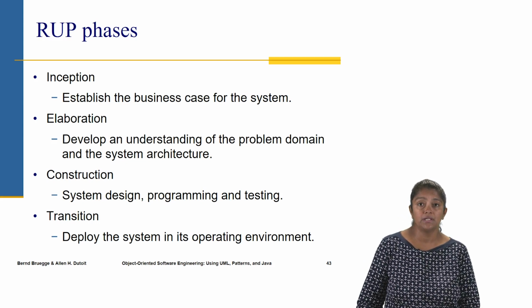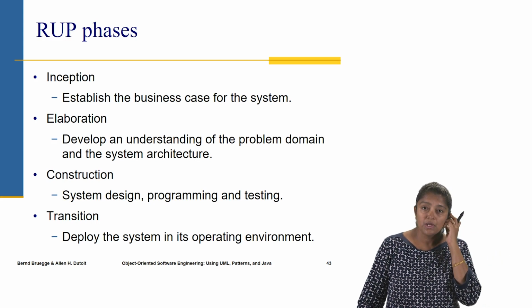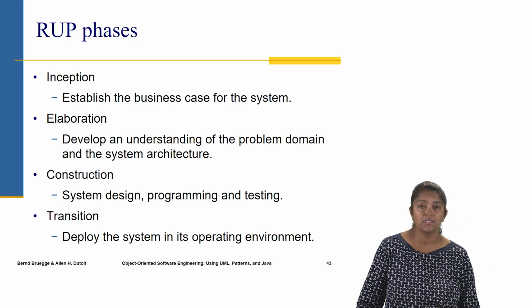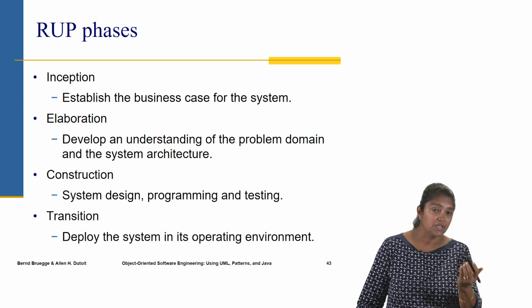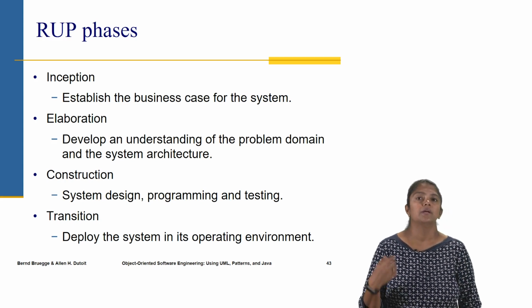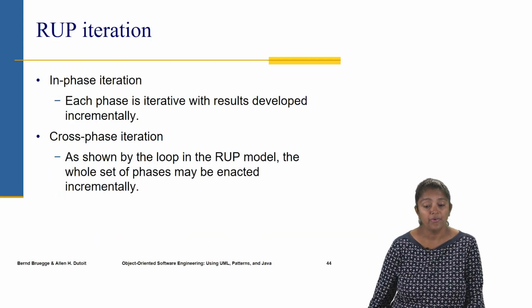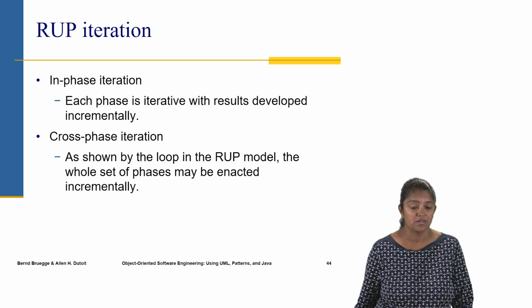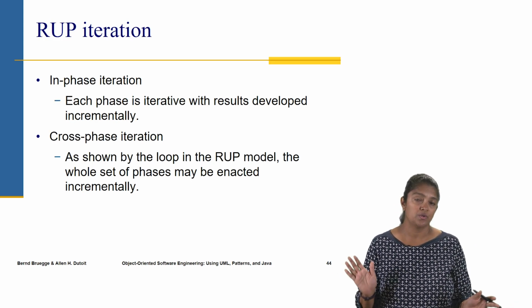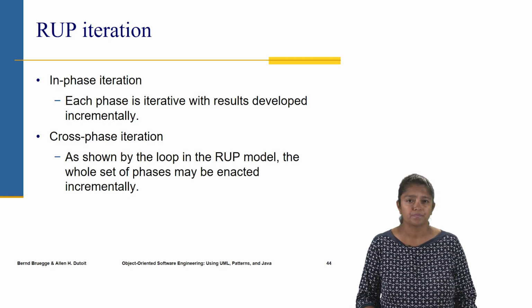So this can be done in an iterative manner. The problem can be broken down into smaller pieces and iteratively built in these different phases. And within inception and elaboration and construction, there could be again multiple iterations. So there's both the in-phase iteration and cross-phase iteration. And so the software can be developed incrementally.